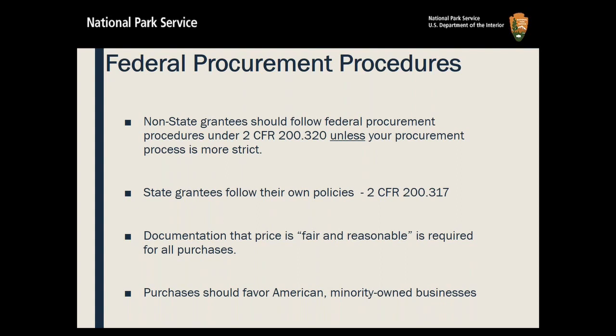For all purchases, you have to maintain documentation showing that the price is fair and reasonable. And I can't tell you exactly what that is. It's going to be different for every type of purchase, but this is something that you have to have so that you can defend yourself in the face of an audit. And all of your purchases should favor American minority-owned businesses if possible.